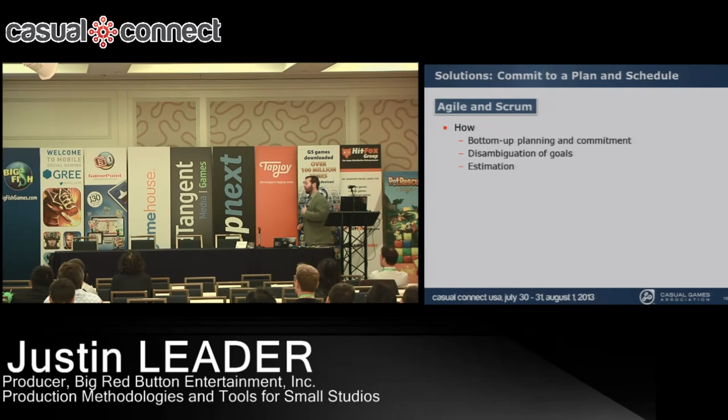Estimation. We know humans are awful at estimating. I didn't realize how much time I had left until that sign went up. So the way that you estimate inside of Agile is through relative estimation, not absolute estimation. I'm not going to say that I have 5 minutes left. I'm going to say I have about a quarter of my time left. Or maybe that's not a great example. Maybe, you know how hard that was that we did last week? Well, this is going to be twice as hard. That's how you estimate in Agile, basically.